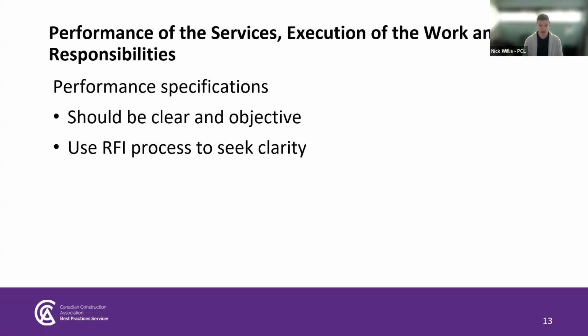This can lead to disputes, and even if the contractor's interpretation is correct at the end of the day, the contractor may have to complete extra work unpaid before the matter is resolved through the dispute resolution process, which can take quite a long time. It's therefore very important for contractors to identify any unclear owner requirements during the contract negotiation process and issue RFIs seeking clarification if necessary.